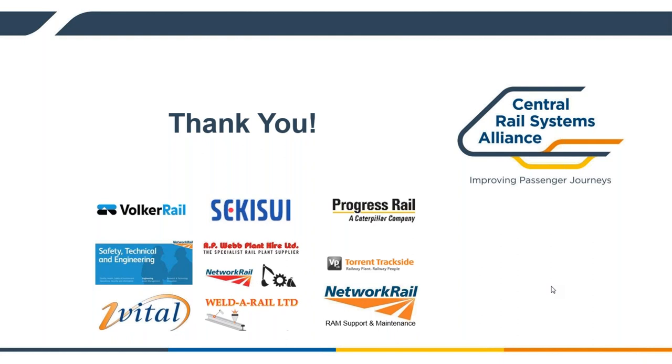Well, the crossings themselves will probably need replacing at some point in midlife, if you like, as we've done with the 2015 change that we did with those. But the actual FFU bearers potentially, and this is obviously just an estimate at the minute, 40 to 50 years. It might be a case where the actual ballast might be needing replacing underneath the bearers before the actual bearers need replacing. So theoretically, we might just take out the layout, change the cut things, but keep the bearers and replace the ballast if the next storm climate needs relaying.